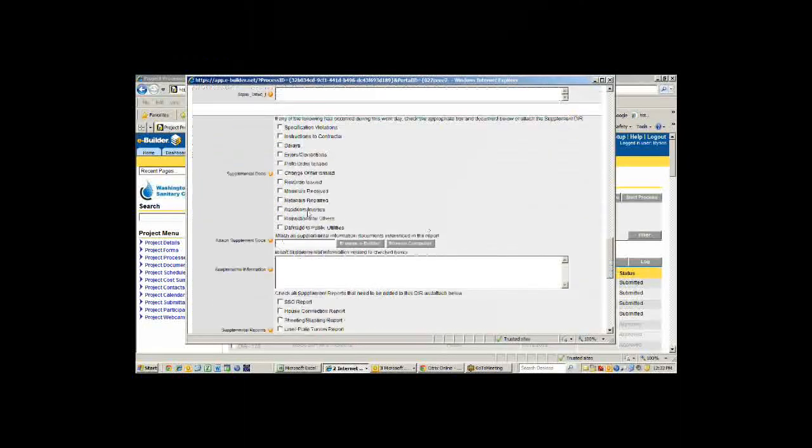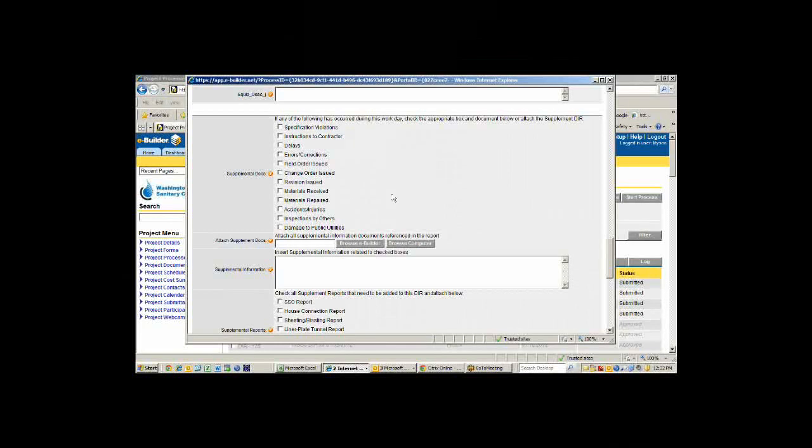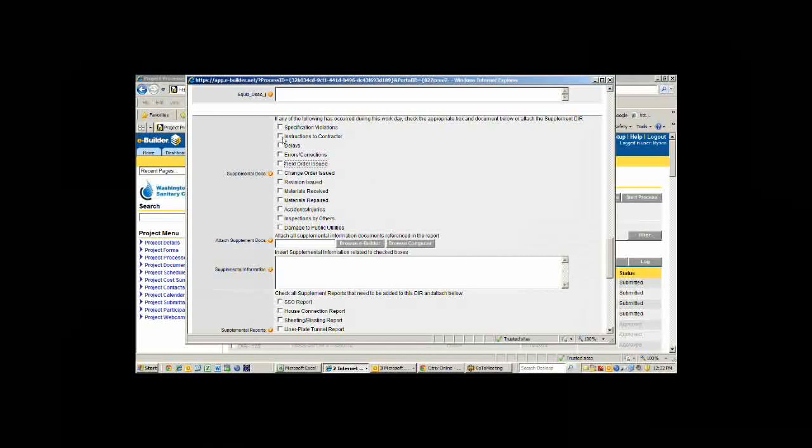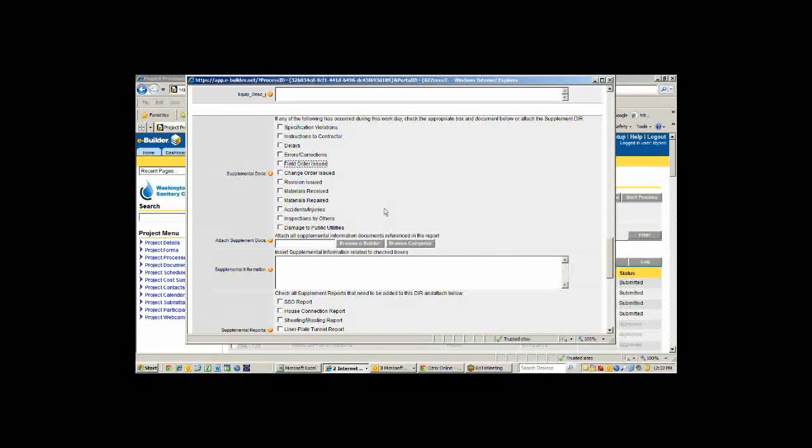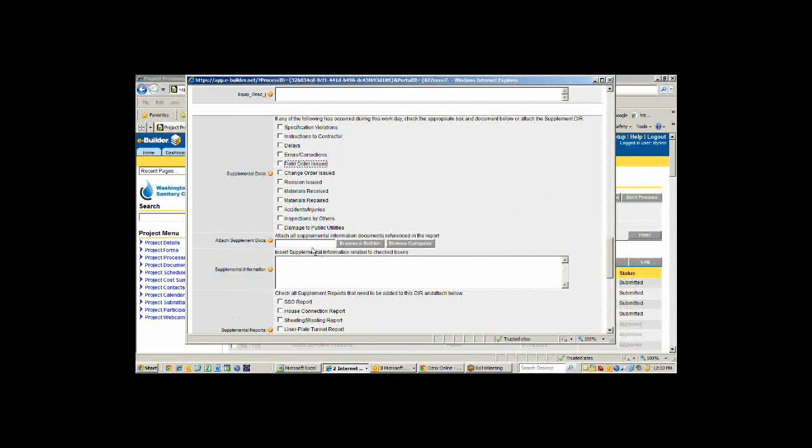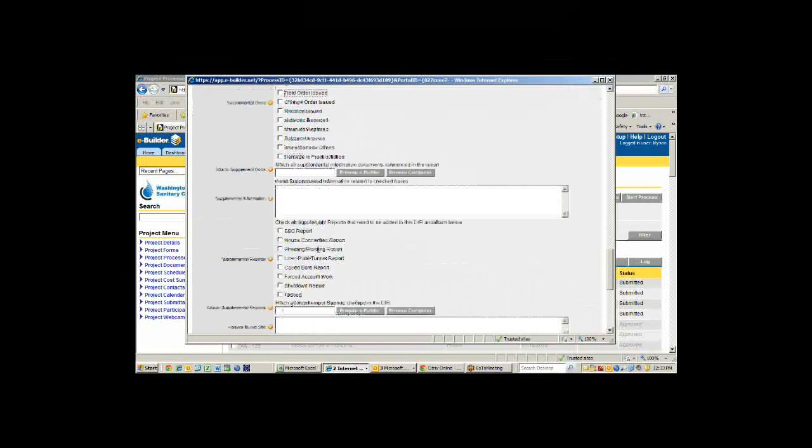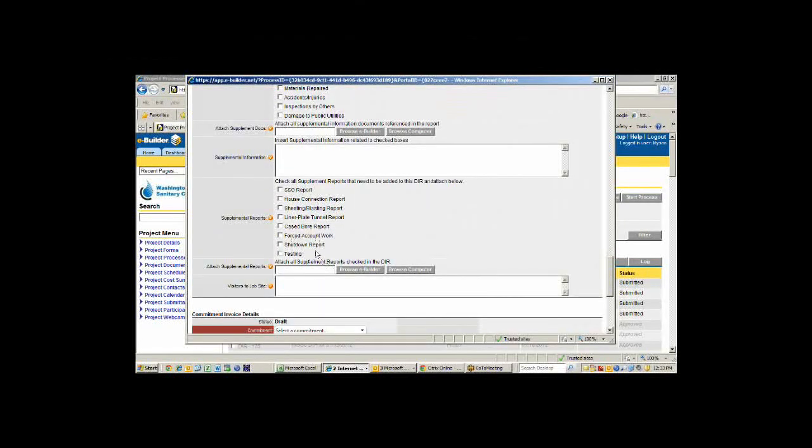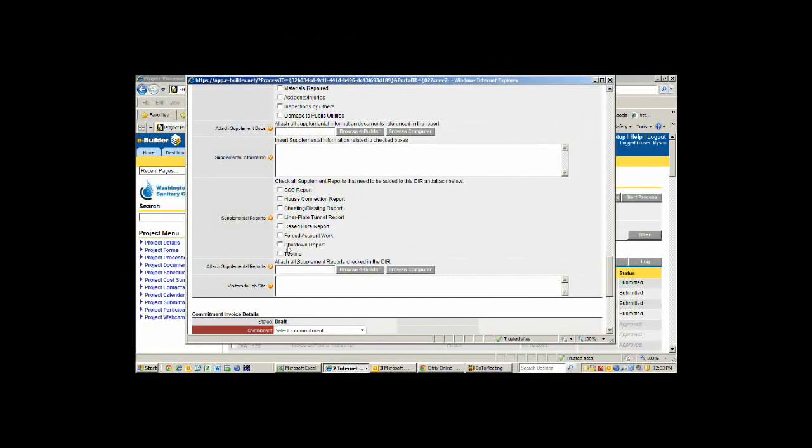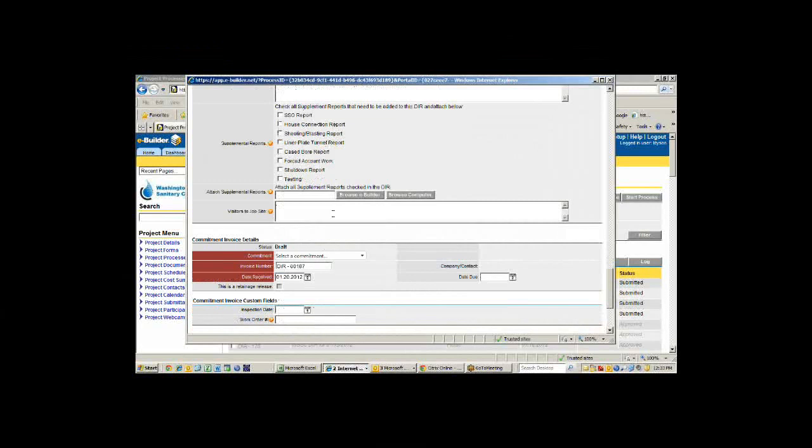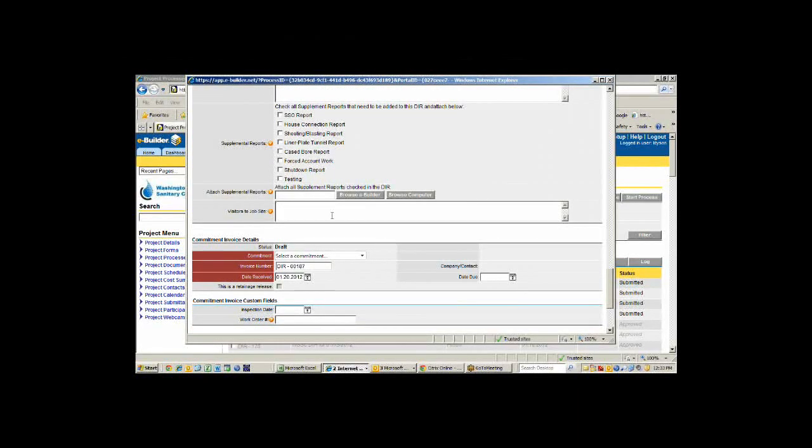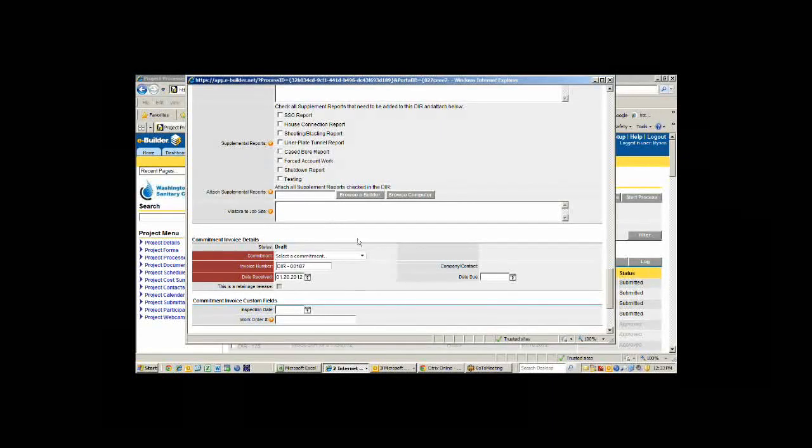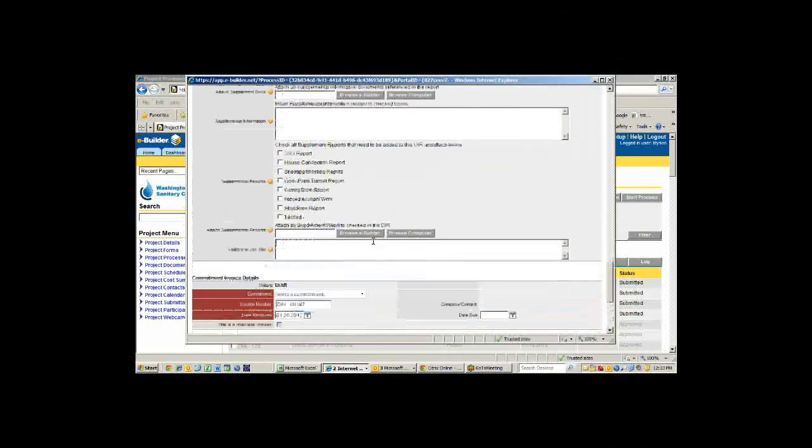Down here at the bottom they can enter any things that happened in the field, like they had to issue a field order or give instructions to the contractor. They can check this box so it's searchable later on. Then they would browse their computer and pull the report in and attach it to this particular process. Same for supplemental information. You know, they may have a case board they're putting in or a shutdown for the water line installation. We can enter visitors to the job site so we have a record of somebody that showed up from the county inspection force or state highway.